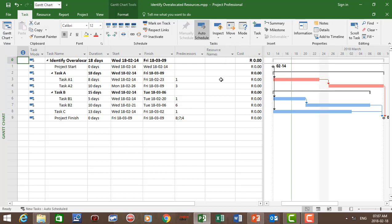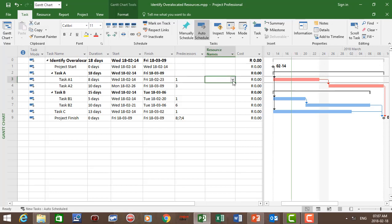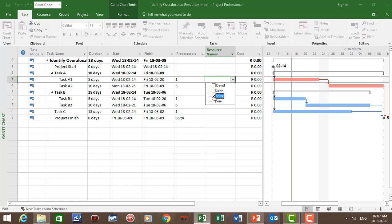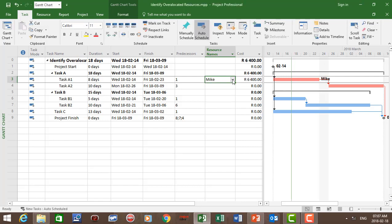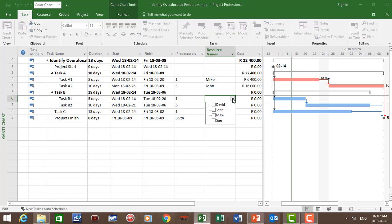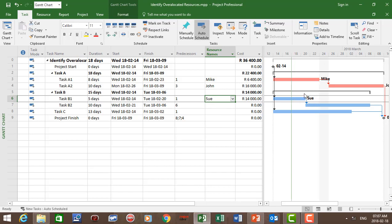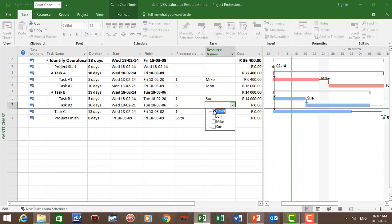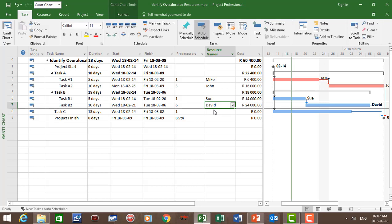Now let's go back to the Gantt chart. Click on task Gantt chart and let's assign the resources to each task. Let's go to the resource name column. For task A1, let's assign Mike. So Mike is assigned to task A1. If there's no percentage after the name, the resource is assigned 100% of his time. Let's go to task A2 and assign John. So John is assigned to task A2. Let's go to B1 and assign Sue. So Sue is assigned to task B1. For task B2, let's assign David.